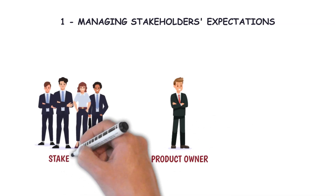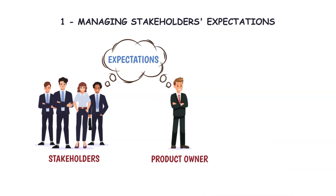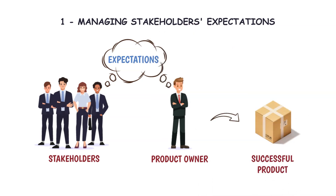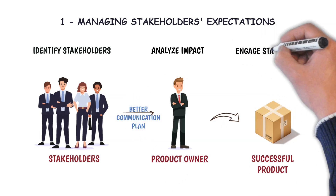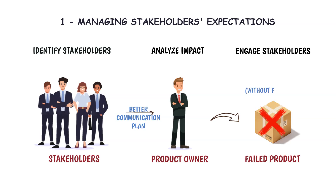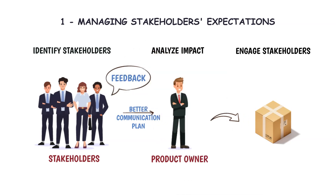First, managing stakeholders' expectations. A successful product owner understands how critical it is to manage stakeholders' expectations to make the product or project successful. We advise three simple steps: Identify stakeholders — it is crucial to identify customers, users, sponsors, and governance, including internal and external. Analyze impact — product owners know how to analyze the impact of identified stakeholders on the product goal by understanding their influence and authority, which helps design a better communication plan. Engage them — a product fails when it gets developed without getting frequent feedback. Scrum is an empirical process designed to get feedback at the end of a sprint, and product owners invite stakeholders during the sprint review to help the Scrum team get feedback.